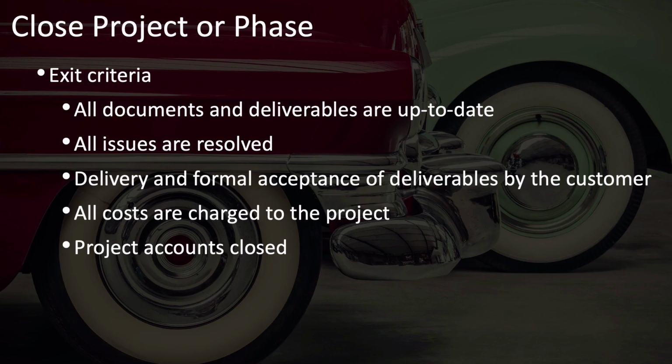Now, if you're closing a phase rather than the whole project, you should still make sure that the appropriate phase documents and deliverables are up to date, that phase-specific issues are resolved, that that phase of deliverables has been delivered and formally accepted, that phase-specific charges have been made, and if you're controlling your accounts by phase, that those phase-specific accounts are closed.